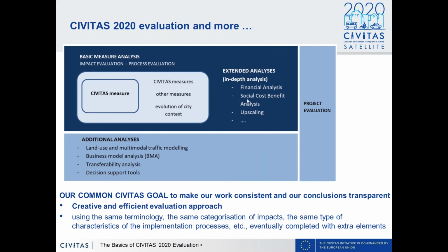Additionally, we could also go further and do a social cost benefit analysis or a cost benefit analysis, as there are different names around. In that case, we try to monetize some of the impacts we have collected and observed into money, and to really come to a real balance of: we are doing that, that's the benefit, that's the cost, and is this positive or is this not?